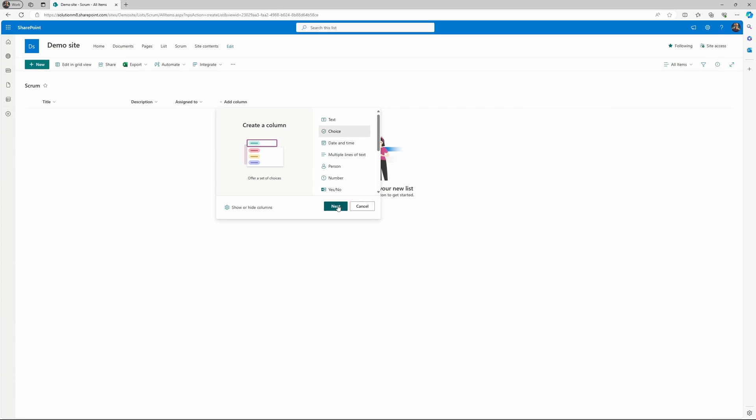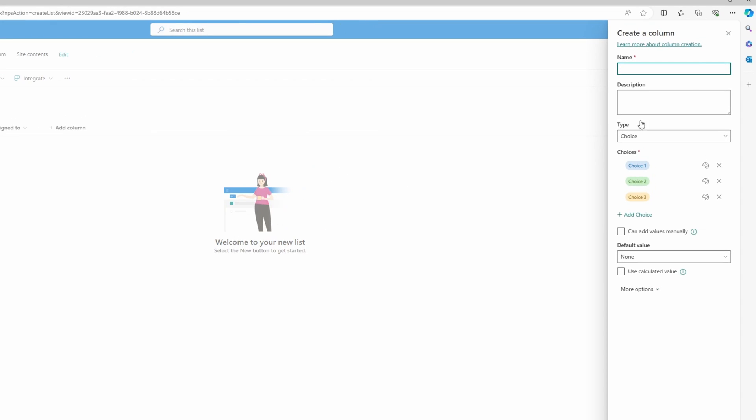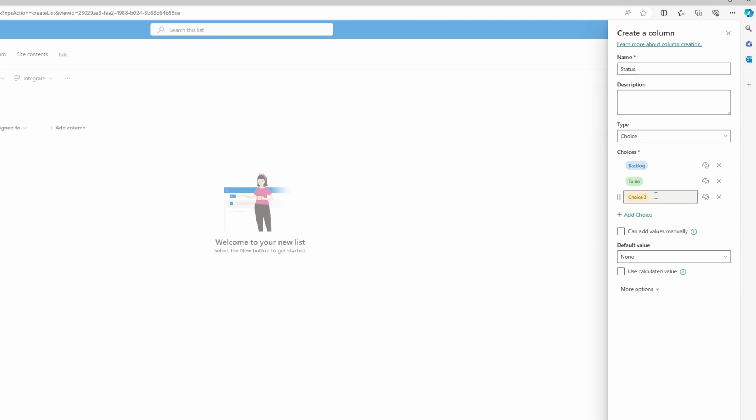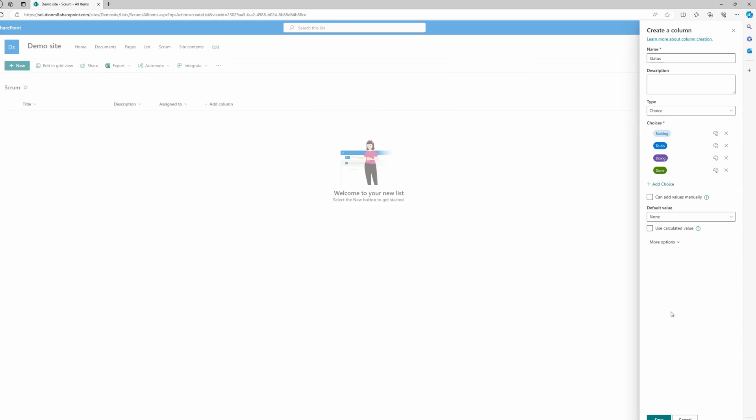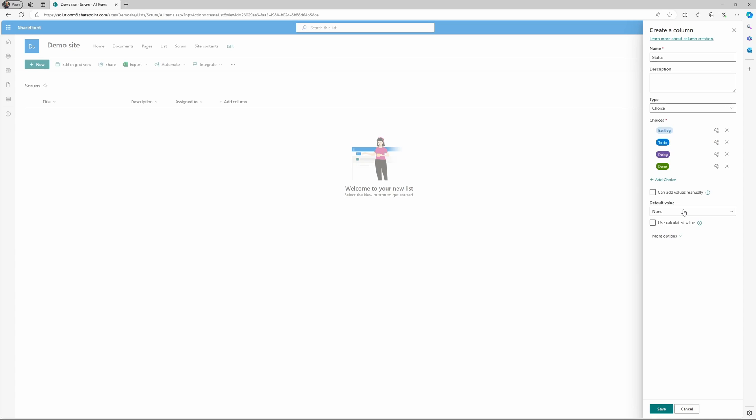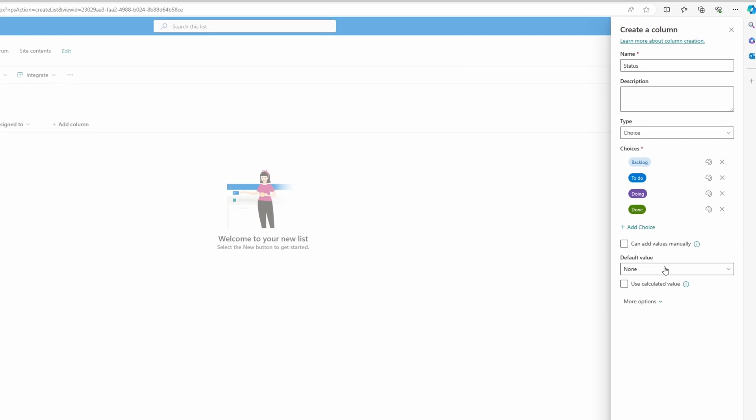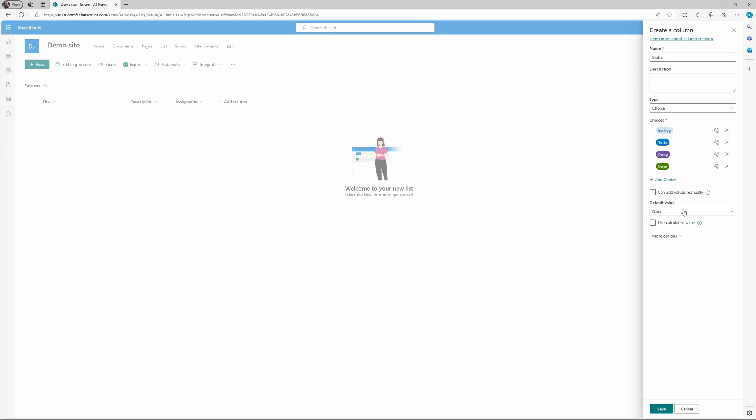And then here comes the important one, that is the status. Our first status needs to be for example backlog. I like to have my tasks in there. Then we have to do, we have doing, then we have done. Let's change the colors. If you would like it to default always to the backlog you can specify it here, but we actually also have an unassigned category here and I'll show you that in a moment in the scrum board.